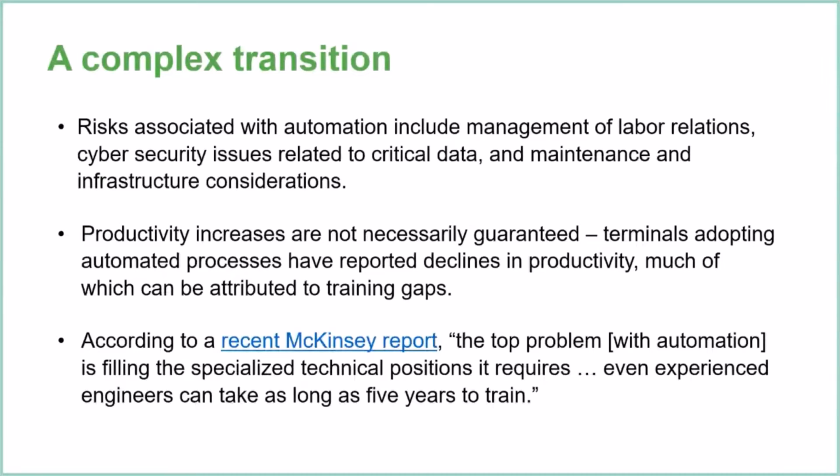And then when things were not working as planned, my experience was that it became a finger-pointing session. It's not the TOS supplier's system that is not working properly, it's the equipment control system supplier, or it's the equipment supplier, and in the end, the terminal operator would be stuck paying additional costs to try to get things working properly.